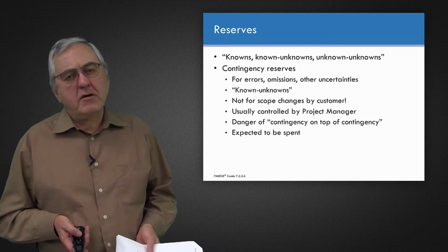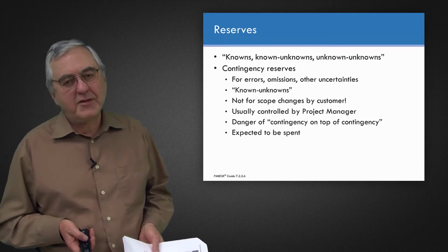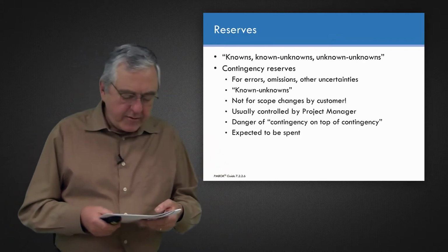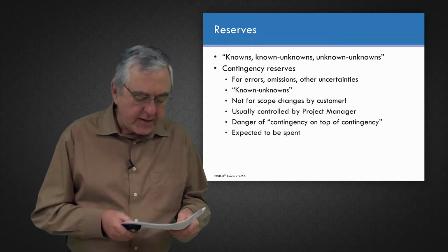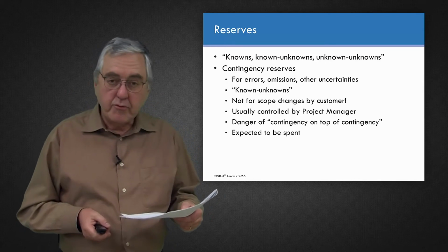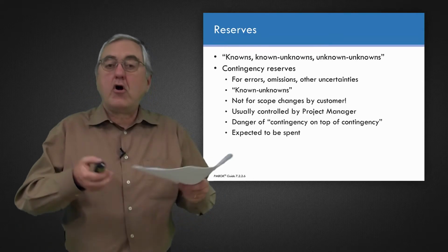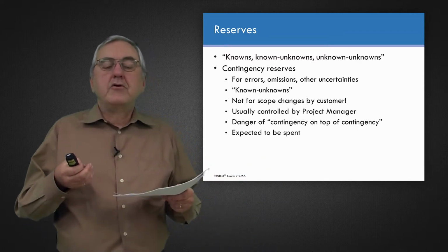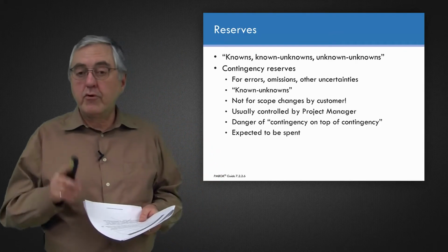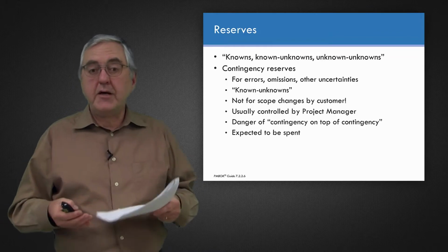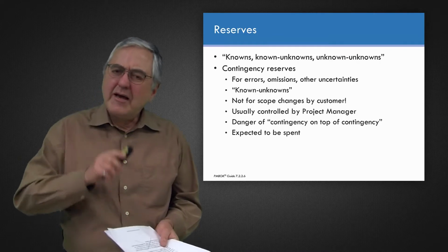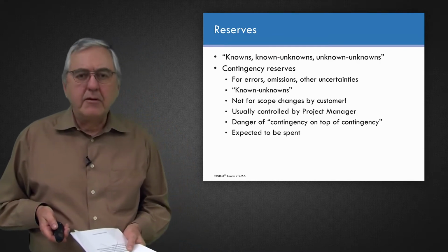Here's another important theoretical part of contingency reserves, which is that it's controlled by the project manager. I'm quoting a project management authority here, Bill Duncan. He says, spending contingency reserve by you, the project manager, does not require approval by the sponsor or the customer. It's already part of the budget. It is already in there to cover certain things, you just don't know which ones, so it does not require approval by your customer or your sponsor because it is part of your project budget and it's controlled by you. Now again, real life is sometimes not quite so simple.